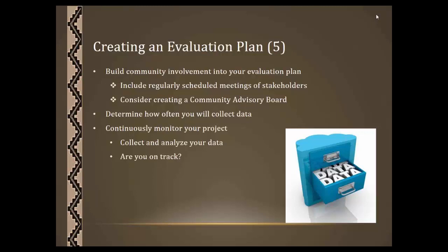Now, had they compiled the information as they were going along, it would have really helped that new project director determine if the project was on track. But it also would have been a tool for the project staff to see if they were on track. It's too late to make any changes to your project's implementation if you're taking a look at your data at the end of your project. Plus, who wants to get handed all those file folders and have to compile all that data? That's why you want to keep on top of your data and analyze it as you gather it.